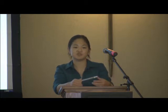The launch vehicles have their own review process. I believe ATV and HTV is at L-6 months that the data needs to be provided to them. So that HTV and ATV are a little bit more difficult, but it's workable. We can work through the timeline. But that's what's written in the requirements, I believe, is L-6 months. For PSRP, if you do the math, I think it's L-4 months is when your data is due. But your PIMs should be able to help you with all that too, your timelines.